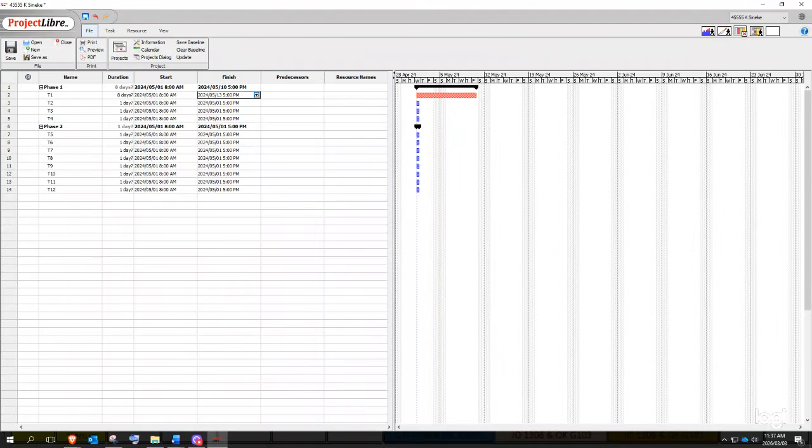In this case, this project is for 8 hours a day, 5 days a week. So I could give you a statement that clearly states how long do the operators or relevant people work on these tasks. Okay, so hence we are choosing the Monday, because on weekends, no one is working.